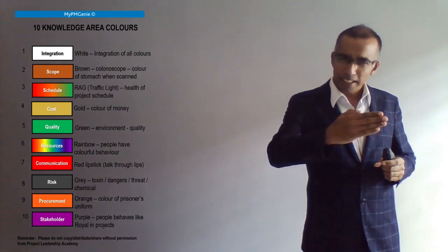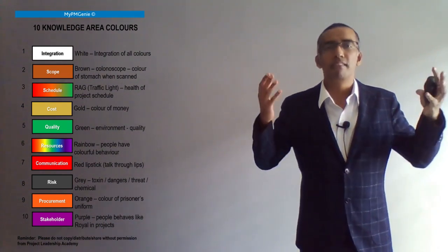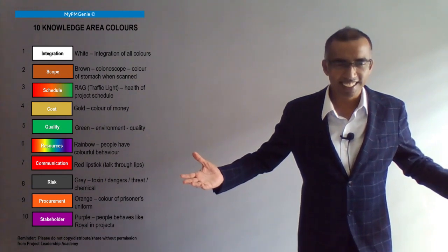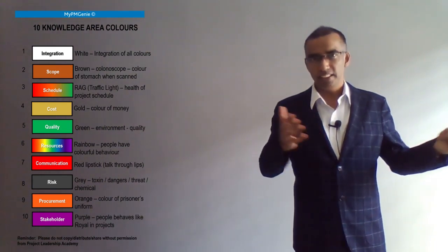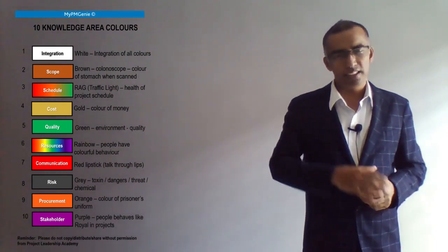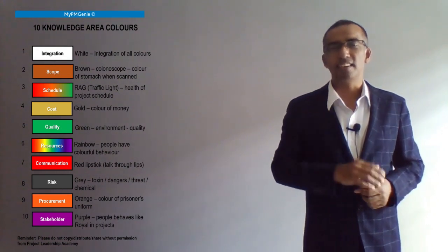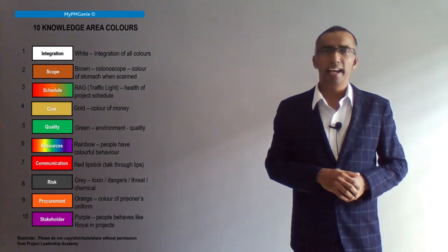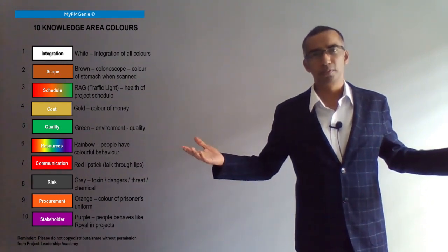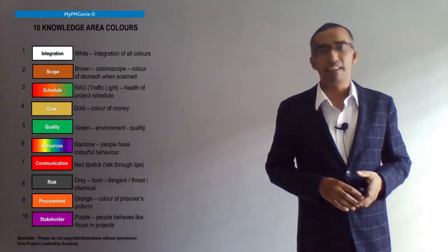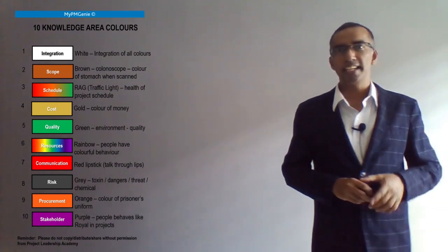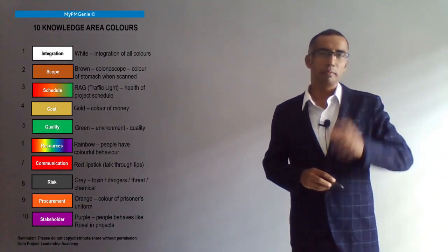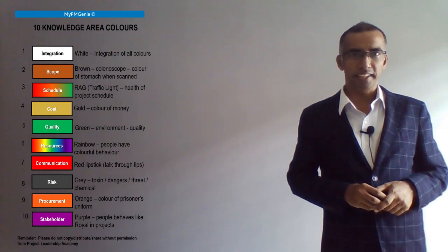Are we behind schedule by a certain percentage, or are we really behind schedule? Right, so green is healthy, amber means there's a certain threshold or tolerance level that we are behind schedule, and red color means we are really behind schedule. So we use this traffic light indicator to represent schedule. Yeah, just remember the RAG, red, amber and green.